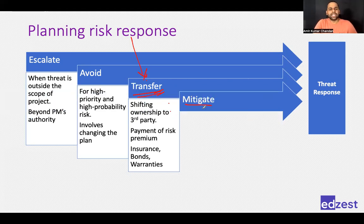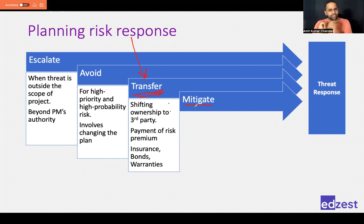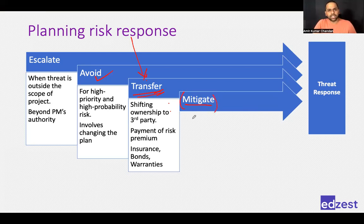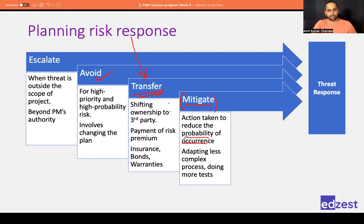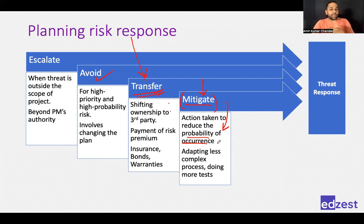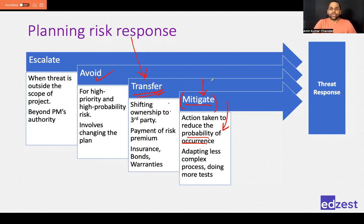The fourth response is mitigate. We commonly use this word in project life for any response, but mitigate specifically means reducing the probability that a risk will occur. When you improve packing, train team members, do extra testing, or add extra resources, you are reducing the chance that the risk will happen — not eliminating it completely. In any project, you cannot eliminate all risk, so all those actions reduce the probability of occurrence. That is called mitigate.